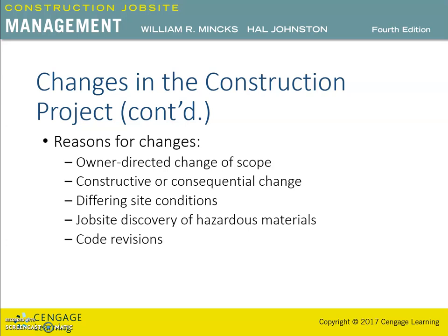If the contract has been signed before the final plan check by the inspection agencies, a change order must be written to modify the change of scope caused by the review. The construction documents are often reviewed prior to pricing the project by contractors, but occasionally some reviews are made subsequent to issuance of the construction contract.